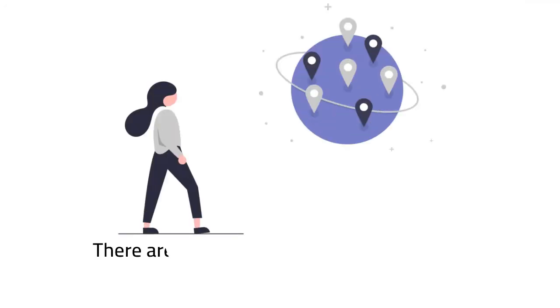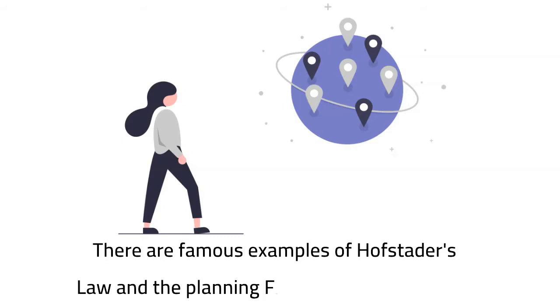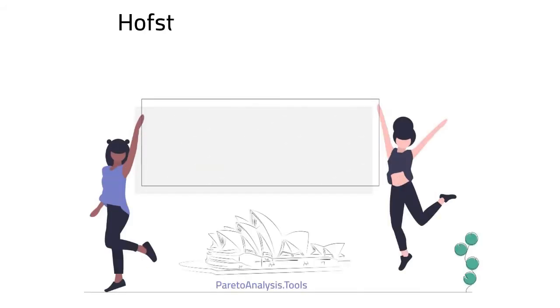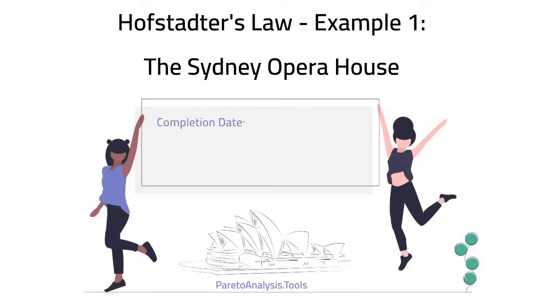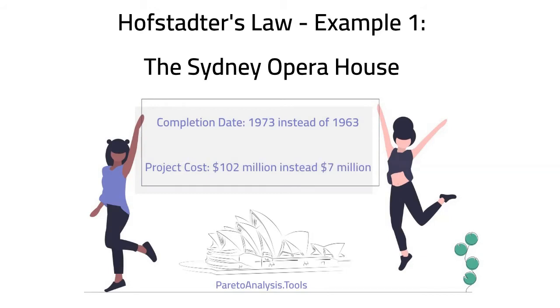Let's start with two world-famous examples of Hofstadter's law and the planning fallacy. The Sydney Opera House was expected to be completed in 1963. Unfortunately, only a scaled-down version opened a decade later, in 1973. Additionally, the original cost estimate of $7 million turned into a whopping $102 million.